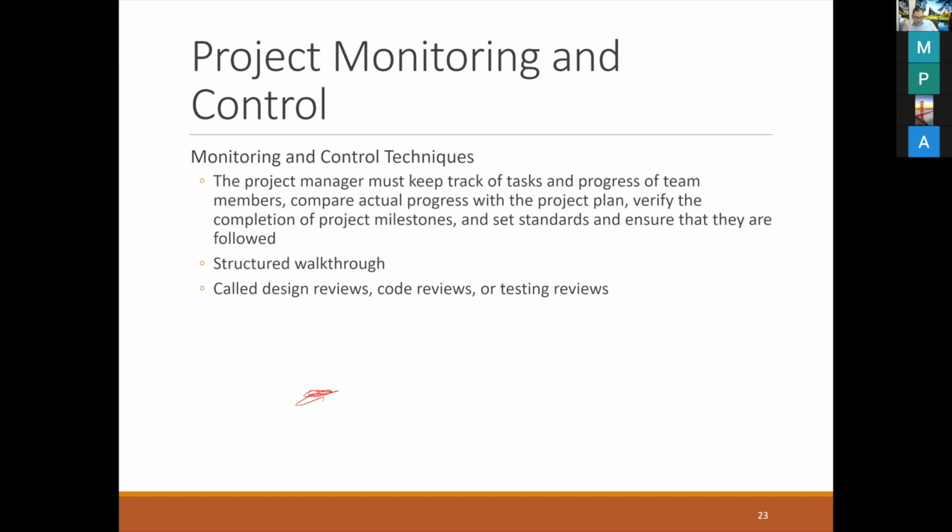That means the total tasks or the total days that you have to spend. If you remember, the critical path was around 95 days. That means the project must not be over 95 days in total to finish. If you spend more than 95 days, that is impossible, because you already spend the longest time for every single task on every path that you go. You shouldn't go longer than that.